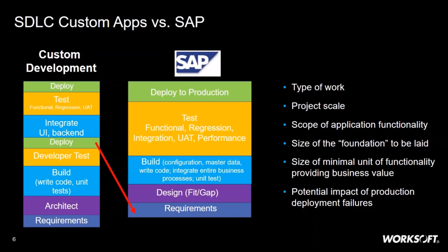And what we're really doing in the SAP world is taking that and understanding the requirements and coming up with the design, which is more of a fit gap analysis, and then going into a set of exercises around configuration, defining configuration data, master data. There will be some code. You're always going to have RICEF objects that you create, ABAP coding that has to be done. But that build really consists of building a process that crosses business units and spans functional areas. The really significant piece is the testing. A lot of organizations think that you may have up to 60% of your project in testing.